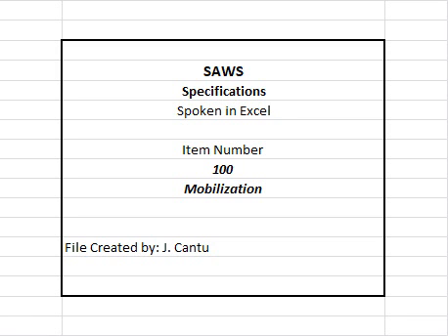4. Upon completion of all work under this contract, payment for the remainder of the lump sum bid for mobilization will be made on the final pay estimate. 5. SAWS General Conditions, GCS, Article 7.2 states payments shall be made by the inspector for approved materials stored on the project site that are deemed necessary and required for the project work. Materials considered as on-site material must be stored on the project site and/or within off-site facilities either owned or leased, signed by both parties, by the contractor.